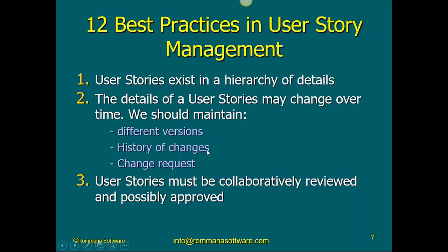I didn't show you the versions, by the way. The versions are there. I showed you the history of the change, that someone had changed the user story. I did not show you the change request. I did not show you the versions. When a user story is changed, we create another version of the user story. And I showed you how we can collaboratively review and approve a user story.